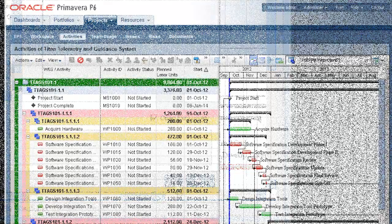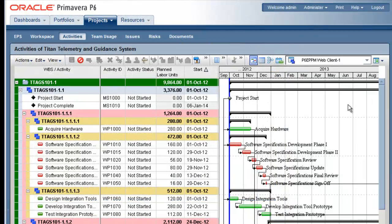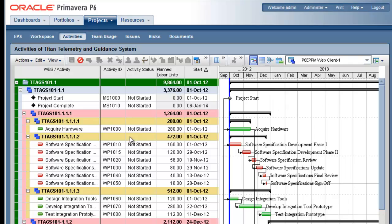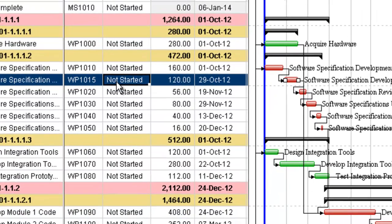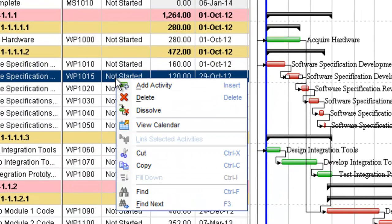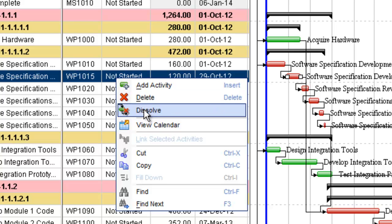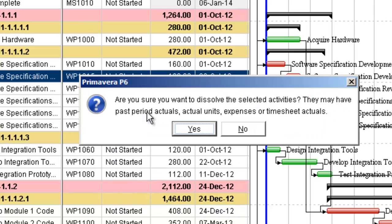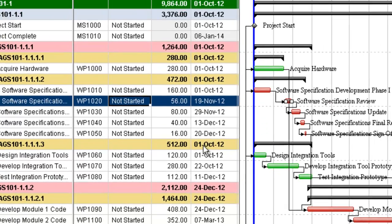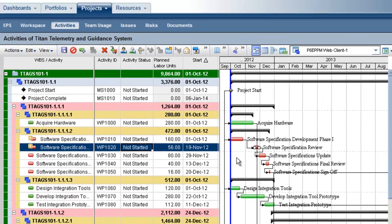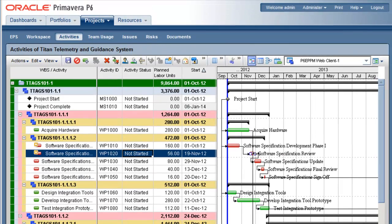The new Dissolve feature is a great time saver when you need to remove activities that are part of the schedule's network logic. By dissolving an activity, rather than deleting it, P6 will link its predecessors and successors together, which beats leaving a gap in the schedule that you have to manually close.